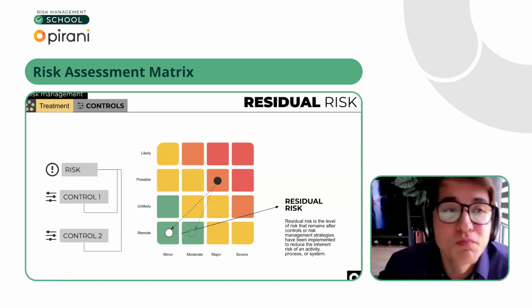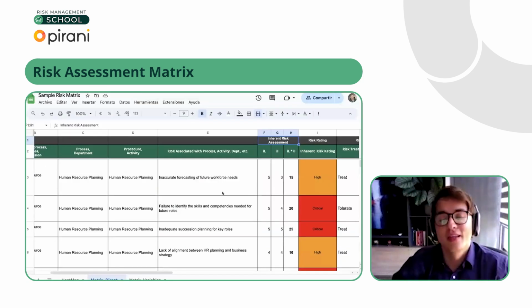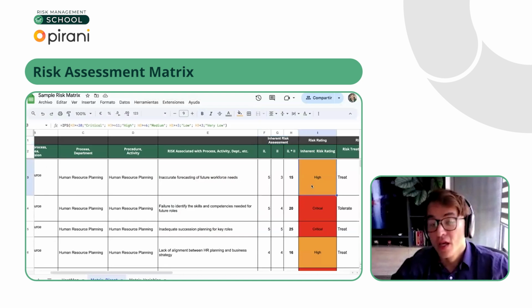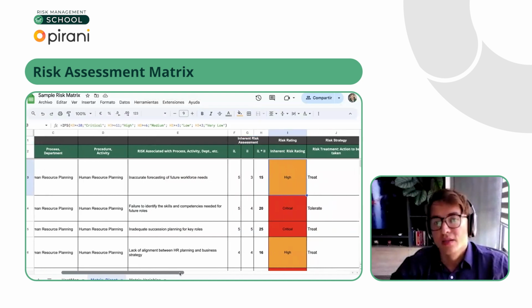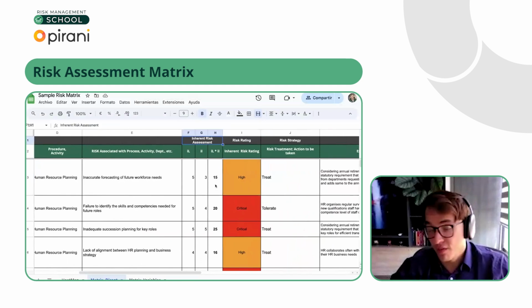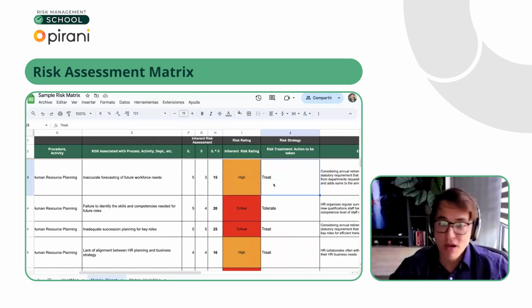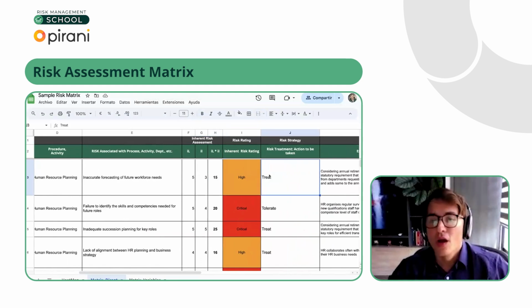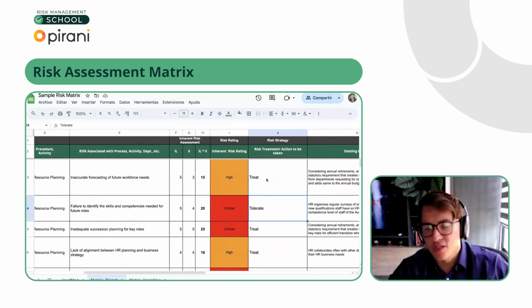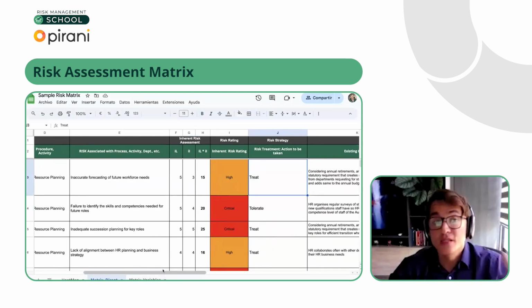It's not just put the thing, the idea that I have for the risk is high. So in this example, that's why we put the inherent risk, in this case 15, as high. So now we can put in my spreadsheet or in my Excel, okay, what is the risk treatment that I'm gonna do? I'm gonna follow with this specific example. So I'm gonna treat, I'm gonna mitigate, or maybe it will be transfer. Okay, it's up to you. Maybe it's a little bit of both.